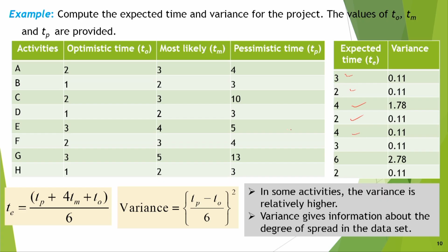Okay. So, here pessimistic time is, say, for example 10. Let us calculate: optimistic time is 2. So, 2 is given weightage 1, and most likely Tm is 3, but 3 times 4 is 12, 12 plus 10, it is this one. So, this becomes 24 and divided by 6. So, it becomes basically 4. So, you see it is coming 4. So, value is close to most likely only, although pessimistic estimate is 10, but it has less weightage. And then similarly for other cases also you calculate and you find out the expected time.